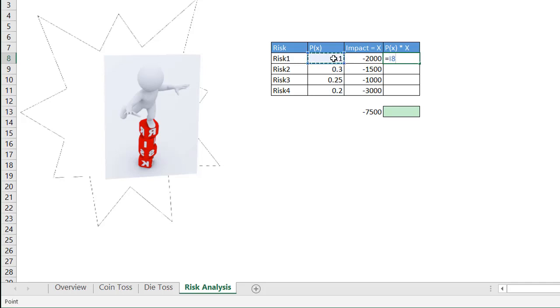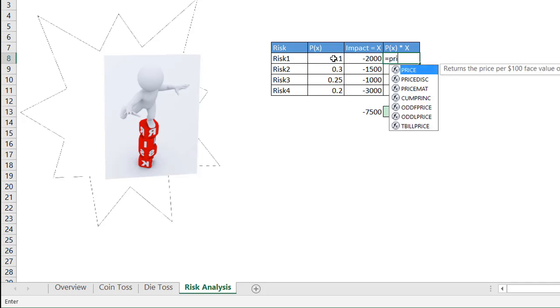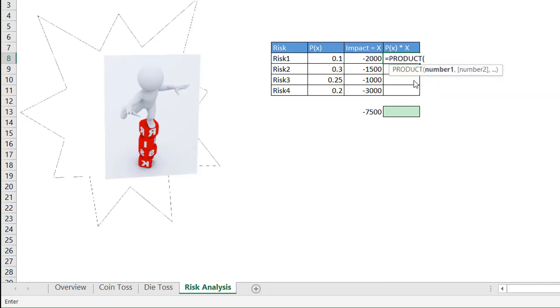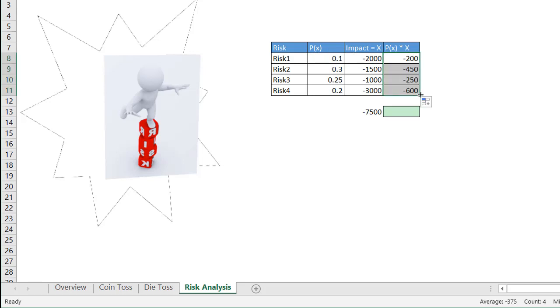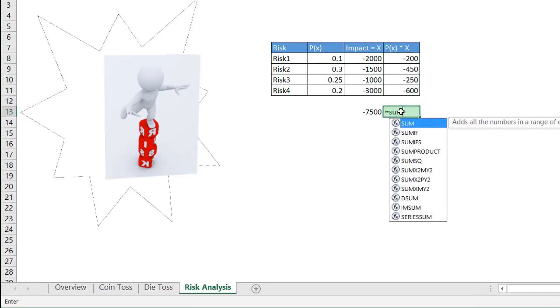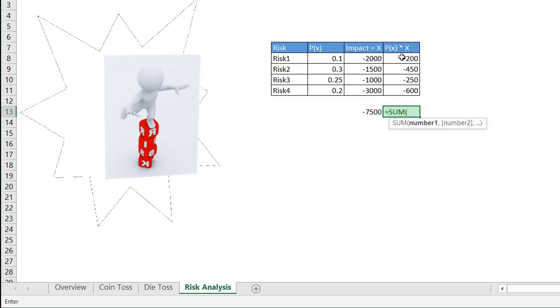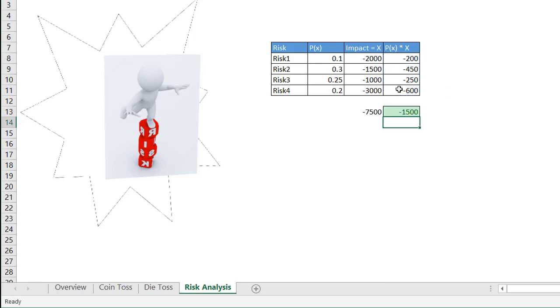So what we need to do is get the expected value of that. Let's use the product function. And we'll use that to multiply our two values. Product and these two values, press enter. That's negative 200. And if I total all this, I could have used sum product function here. If I total all this, that gives me my expected monetary value.